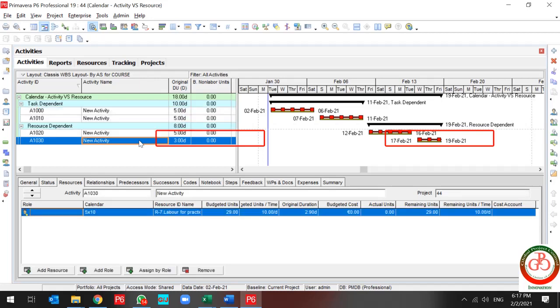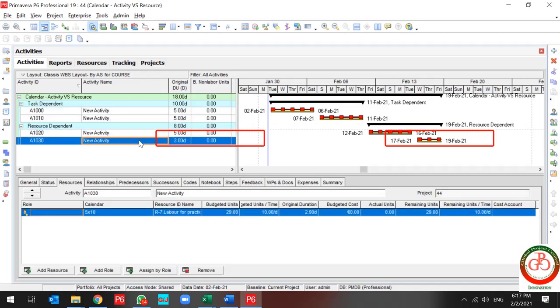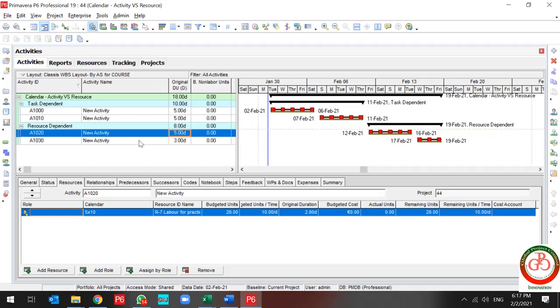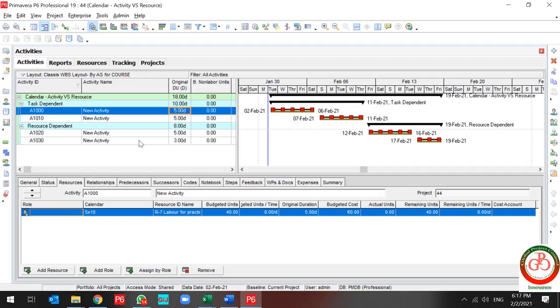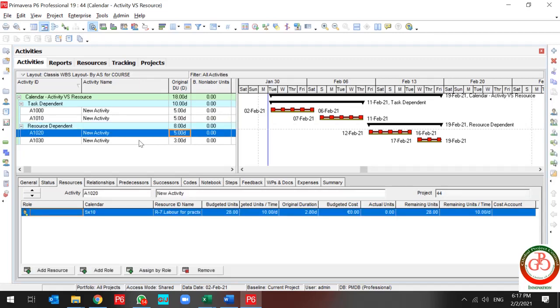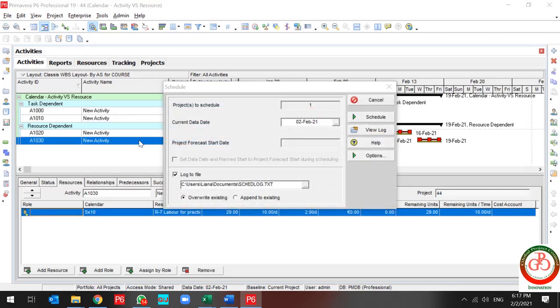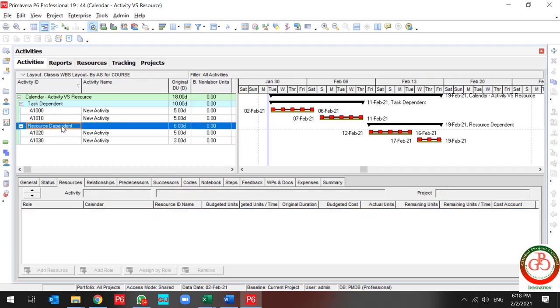My last activity, the resource dependent, duration changed from five to three. But what happened to this activity? Let me undo and change the duration. It's fine. It doesn't work because the work is done in three days. In a resource dependent activity, availability of the resource drives the activity duration.